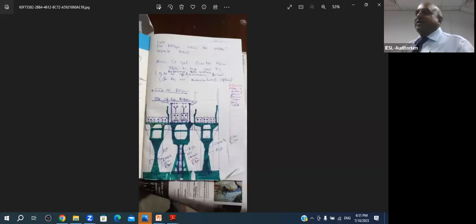Now it all comes together. We keep a time lag of four hours to maintain the sample for 4 hours. We have to double the admixture. The normal admixture, you have to use a double dose, and only then can you maintain the workability after 4 hours, because we have to allow 4 hours to consider the traffic situation. So by the time we actually use the concrete, we are paying a lot unnecessarily.